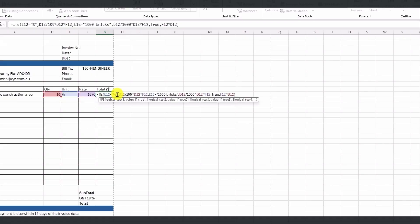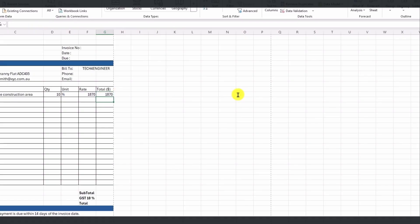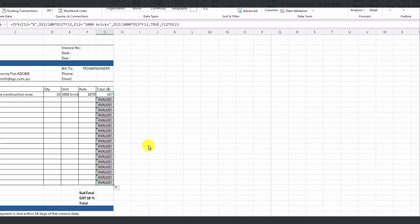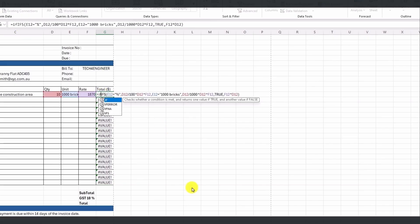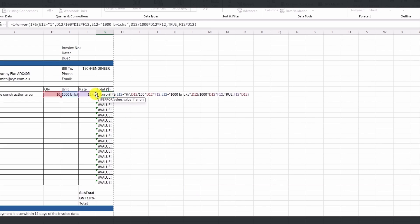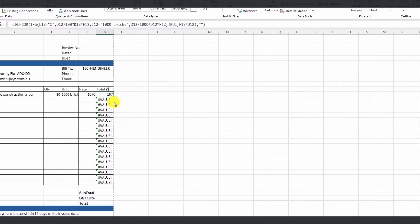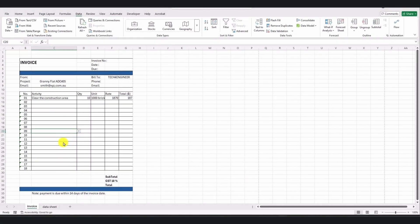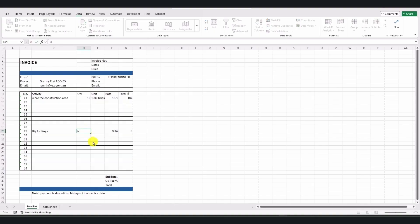Or, if the price is based on 1000 bricks, and we have the units as 1000 bricks, then the total price should change accordingly. For that purpose, I would also like to write functions for these totals, so that if the units change, the total prices should be updated. I'm going to use the IFS function, so write equal to the IFS function, open parentheses, and write. If the cell E12 is equal to percentage, then divide D12 by 100, and then multiply it by the price cell, which is F12. Then in the second logic, if E12 is equal to 1000 brick, then divide the quantity by 1000, and multiply it by the rate. For all other cases, we write true, and multiply the rate by the quantity, and then we close the parentheses. Here we have a mistake. You would need to put quotation marks, and then press Enter. Now I can test it, and it works perfectly.